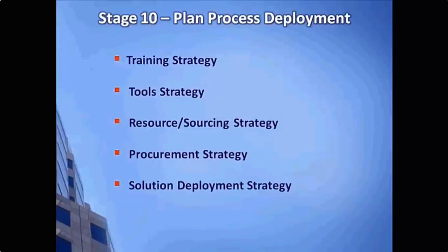In our last step, others will review the process guide, again to make sure there's agreement with the items that are in there. And then in Stage 10, we're going to be assembling the transition actions that we developed and agreed in the prior stage and putting these into a detailed work plan. The development of this plan should happen in two passes. The first pass is taken directly from the transition actions that we identified as we went through the various design stages up to this point. The second pass should then integrate these into an overall master transition plan using the individual plans from each process owner, the architecture, organization, and governance teams.